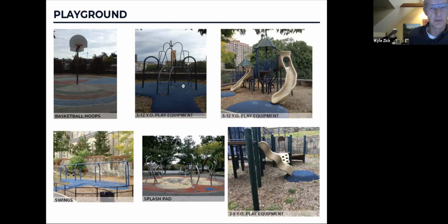And typically Boston Parks would tell you that they're on a cycle to redo a playground every 15 or 20 years because that's the wear and tear duration, but also the codes relating to playgrounds change in that time frame. And so do the way people play, and some of the trends in play styles and play equipment. So while this may have been the rage at the time, there are all kinds of options that we'll ask you about for the new playground. And I've already mentioned the splash pad. It's certainly got some wear and tear in some of the components of the water play, the lighting, and the surfacing. So this is something we'll look at.